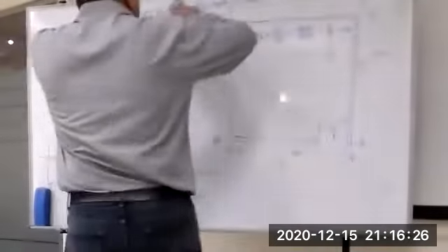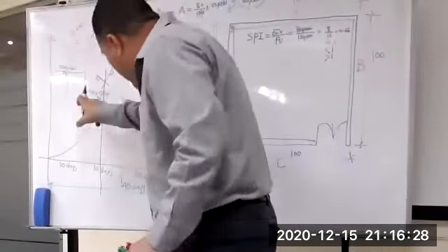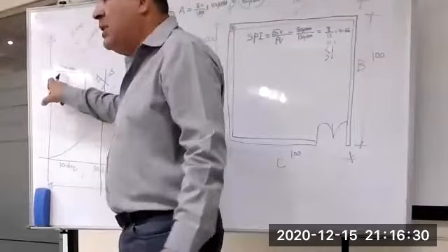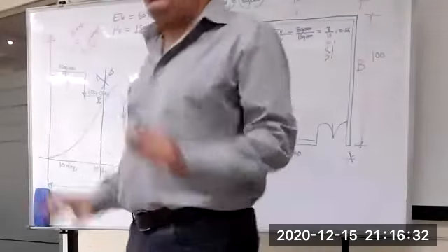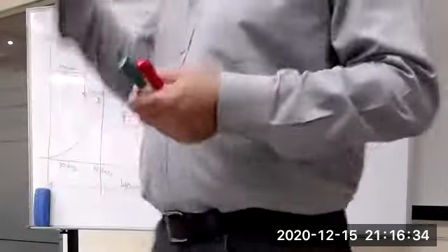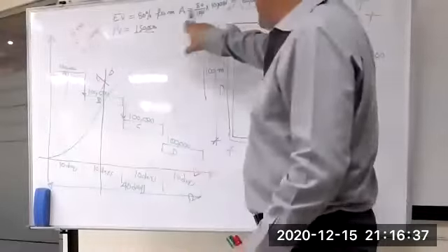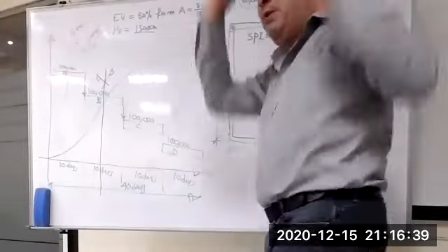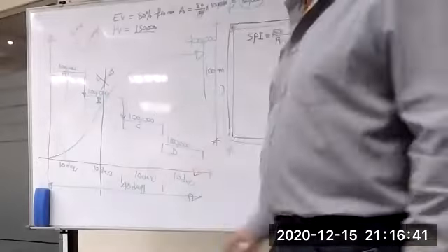Assume in day number 15, you finish 50 meters here, and you achieve here 100 meters, and you start as planned. That means 150,000 divided by 150,000, I am happy. Now, assume another scenario.